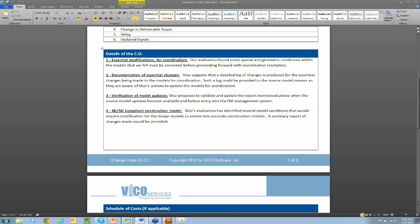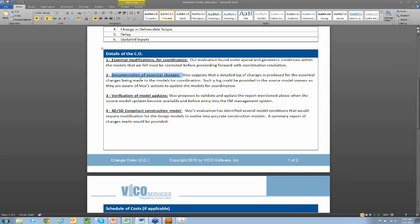So in this example here, we've gone through and we've identified just the essential modifications. So again, everything having to do with space, that 3D space, making sure that everything's represented the way it needs to be before we start routing all the MEP elements in there. As we make those changes, we can document them for you so that that documentation can then be given back to the design team and they can update their models if they choose to.